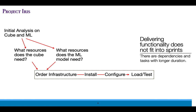As an example, in traditional projects where you were creating your own infrastructure, you'd have to do analysis on the amount and type of infrastructure you would need — what resources the cube needed, what resources the machine learning model needed — then order that infrastructure, install it, configure it, and do the initial load testing. If you're using cloud infrastructure, this task gets much simpler. You still have to do some analysis and understand the resource usage, but the cycle time to order, install, configure, and load diminishes dramatically.